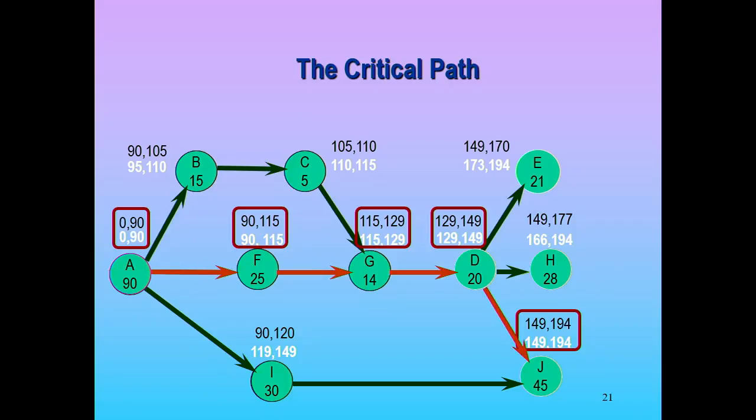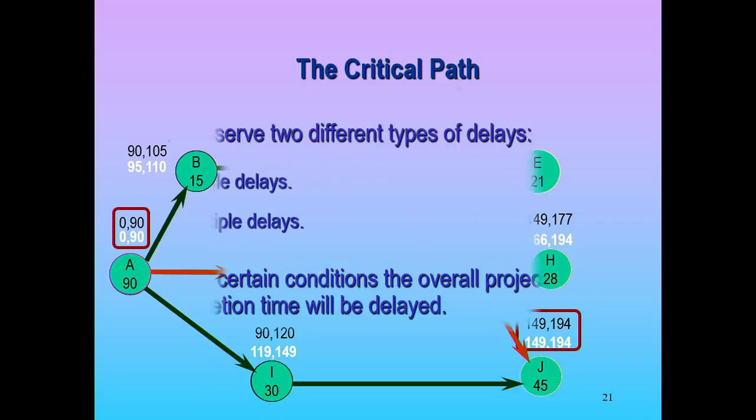And if you use something like Microsoft Project, it actually does that for you. It usually makes those activities red, right? It depends how you look at it, but they're red because it tells you as the project manager, hey, these are critical path activities. This is the longest path through the network. So that's the critical path.